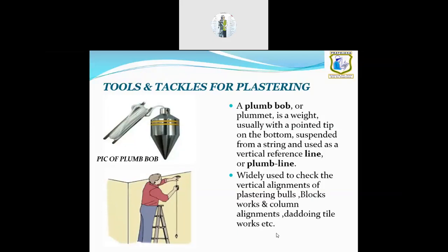So when the pipe comes in the center of the tile, it's very difficult to place it, no? So we'll ask them to place that exactly in the 4 corners, so that the chipping can be done and the tiling can be done easier. That's why the plumbing laying drawing is also very, very important during tiling operations. All this pre-engineering should be done before you start the construction activity in dadding.